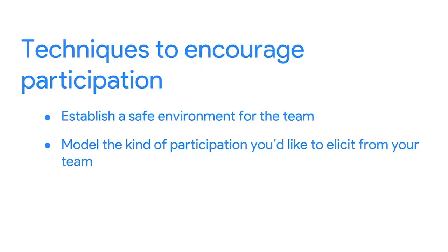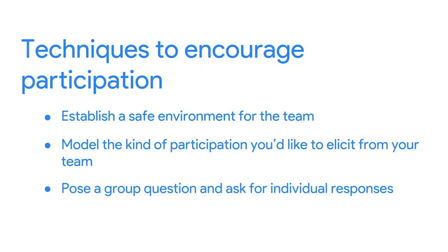Another useful technique to encourage participation is to pose a group question and ask for individual responses. For example, you could ask your team members to each think of one success and one challenge from the project so far. Then ask each team member to share their responses.